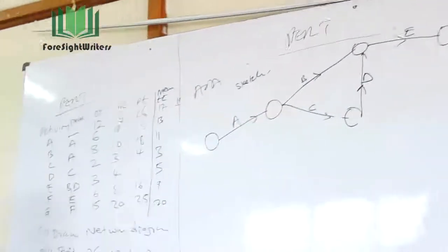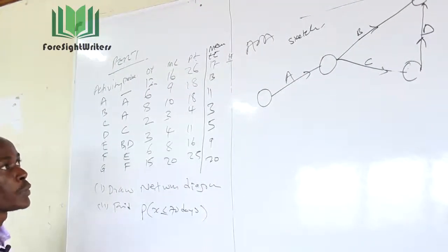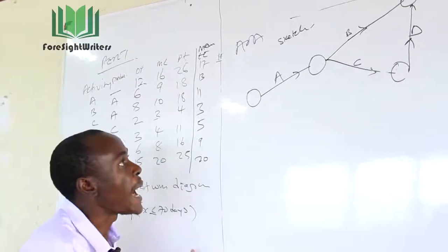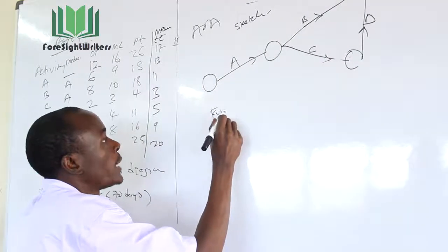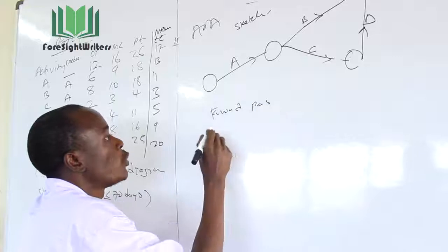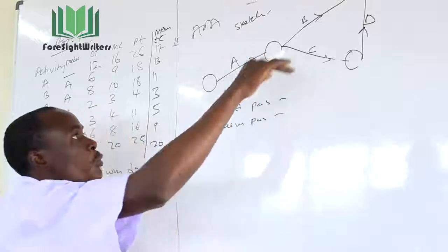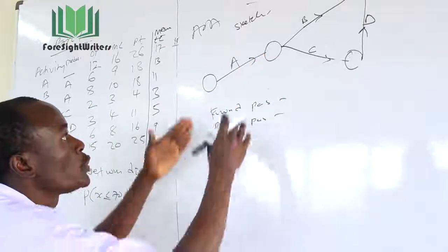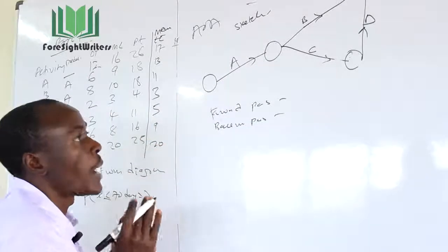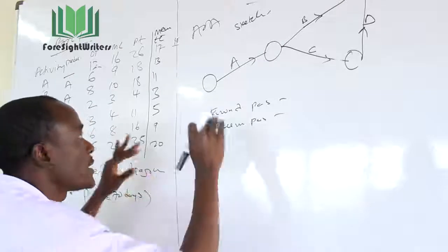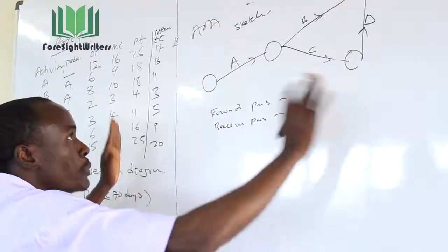Now I need to calculate the critical path. How long is the project supposed to take? That is very important. To calculate the critical path, I can use two methods. I can use the forward pass and then the backward pass. If I do this, I find the floats between activities. The one that has 0 floats all throughout is the critical path. Alternatively, it's just inserting all the durations and assessing the longest path. That is the most common definition: the longest path is the critical path.